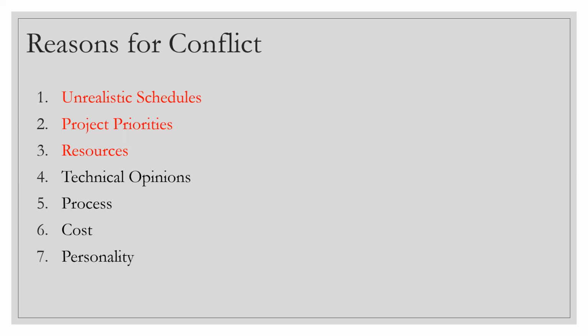We may forget that we got some contract employees in the program whose contract was supposed to be renewed in the middle of the project, and the salary would have gone higher, the cost would have gone higher because of many reasons, right? And since that was not taken into account, now the cost has increased and the finance will stop you.